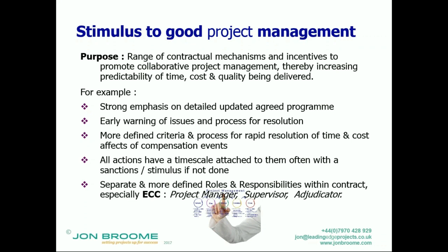There's a strong emphasis on a detailed, updated, agreed program. It's stated in more detail than other forms of contract. It's updated regularly. There's an early warning process for early warning of issues. There's more defined criteria and process for rapid resolution of time and cost effects of compensation events, so claims and variations. Believe it or not, stating the bleeding obvious, this is where most disputes happen.